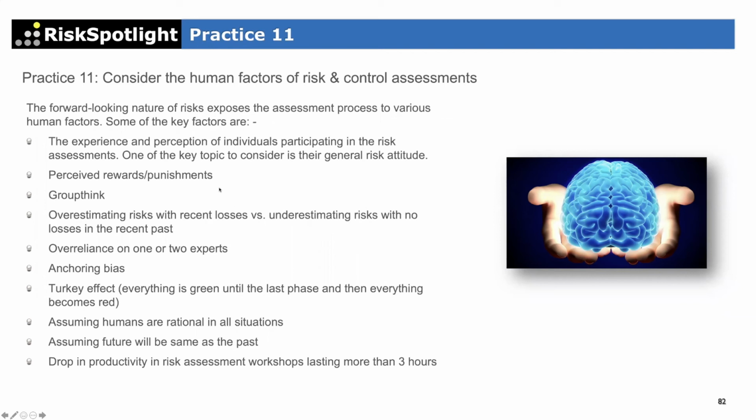From an operational risk perspective, the first one we want to talk about is the experience and perceptions of individuals who are doing the risk assessment. Are the people doing the risk assessment very risk averse, or are they risk taking? Depending on their risk attitude, their responses will reflect that attitude. So we need to adjust the information we get from their assessment depending on the individual's risk attitude.